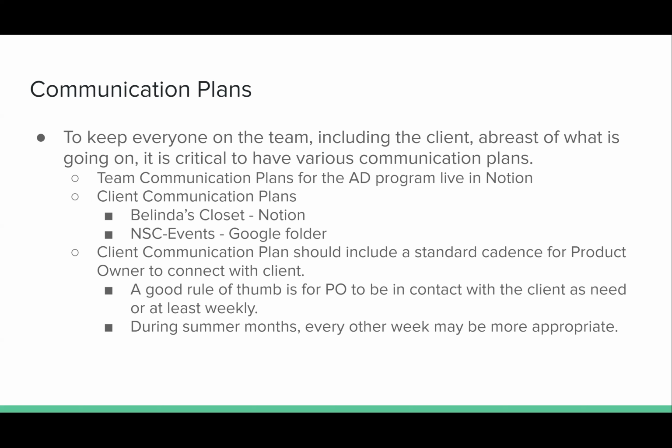The client communication plan should include a standard cadence for the product owner to connect with the client. Right now, this is suggested to be at least weekly during the summertime when maybe less is going on, or at least in my experience working on the summer project, we didn't have something to report to the client every week. A 2-week cadence probably at a minimum is something that would be a good rule of thumb. And obviously that will change as well.